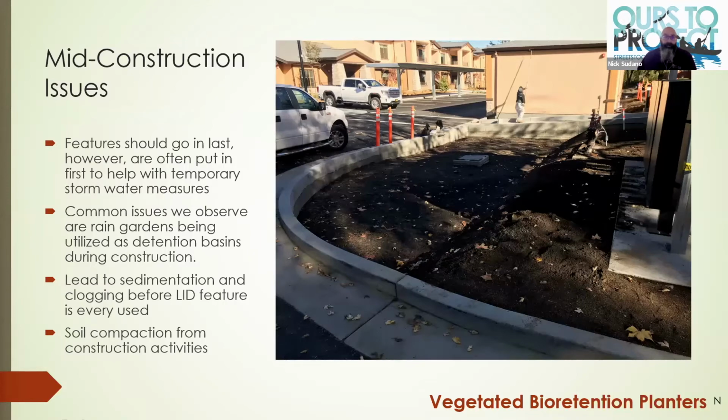These do not replace the temporary BMPs required by general construction or even the construction general permit for sites that are over an acre. Any sedimentation that's allowed to flow into here, or sediment and debris, potentially could clog or alter that engineered soil, as well as some of the components that go into this engineered feature.